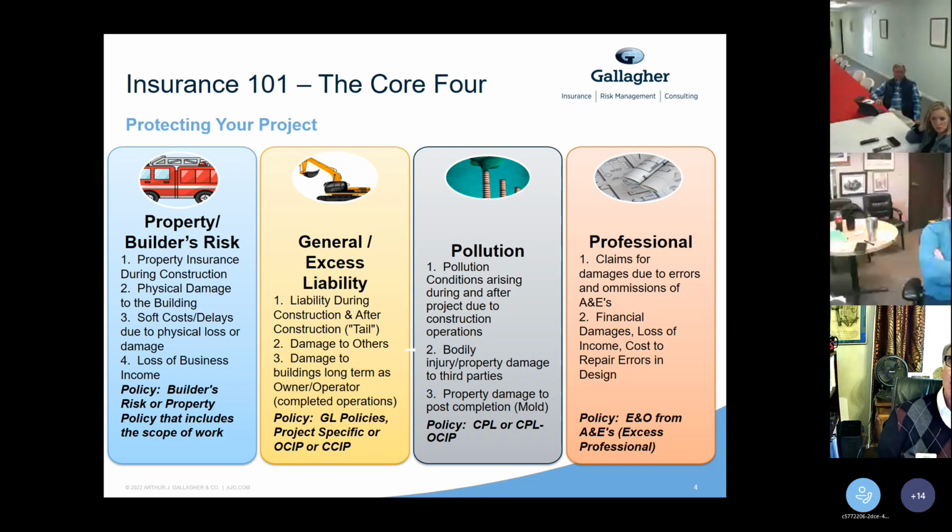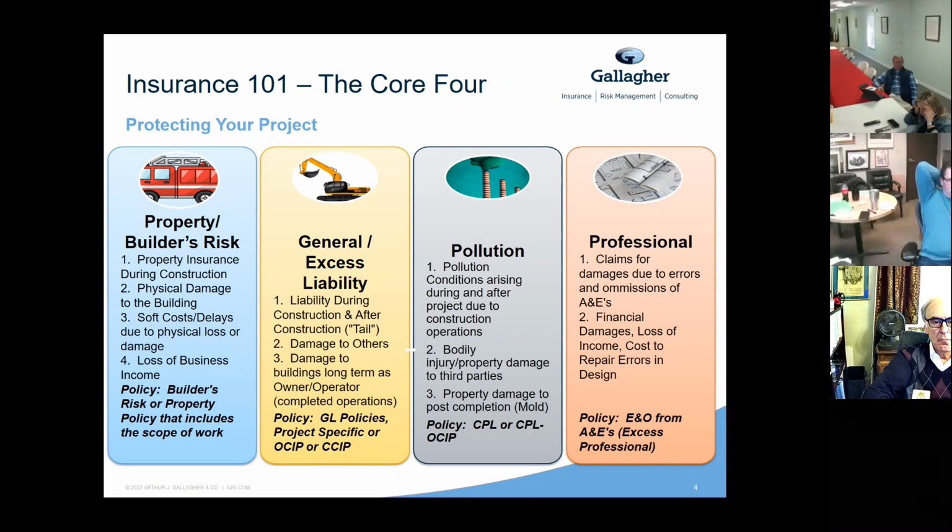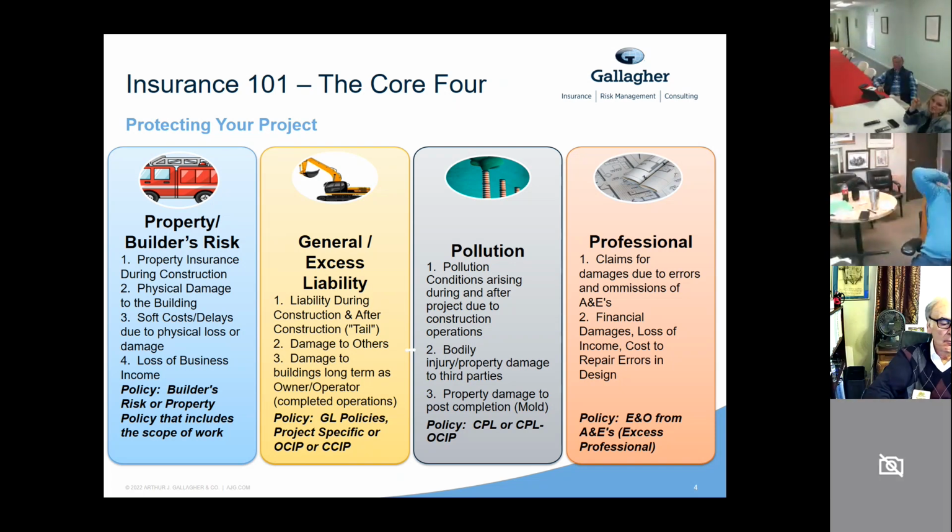I have seen some horror stories of vacant lots that get purchased. Organizations are slow moving to get that GL policy in place, and there might be an attractive nuisance hazard on the lot. So, for example, the claim I'm thinking of is there was an old rusty playground set on this lot. They didn't buy insurance just yet because they were planning on demolishing everything. And unfortunately, a minor did wander onto the lot and get hurt using the equipment. And there was liability for the owner because it was an attractive nuisance.